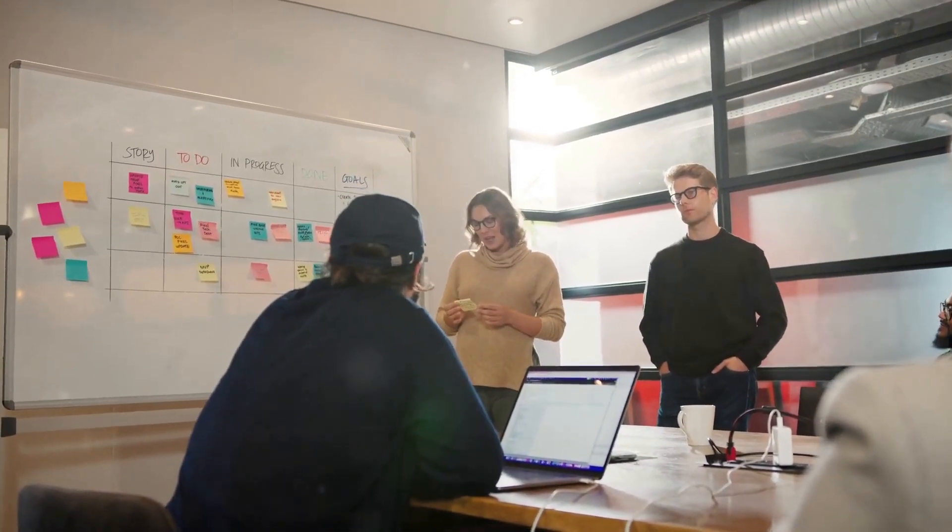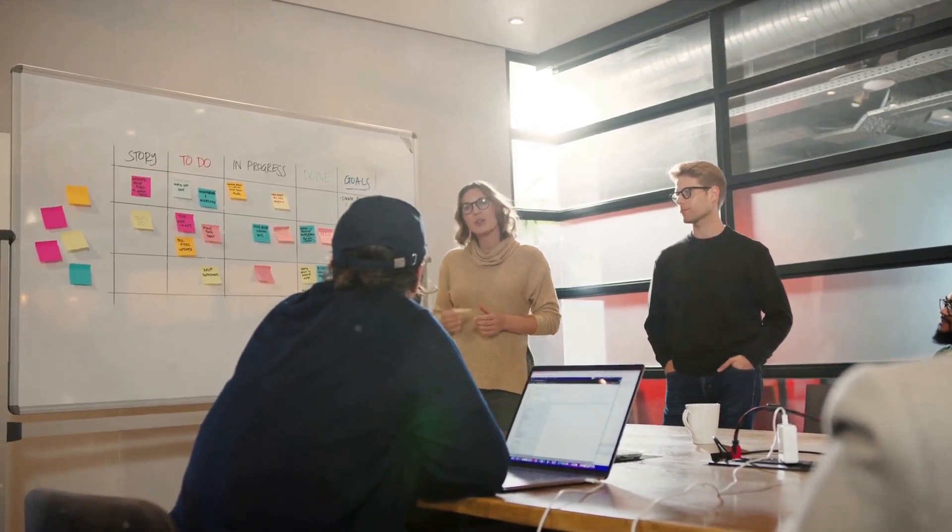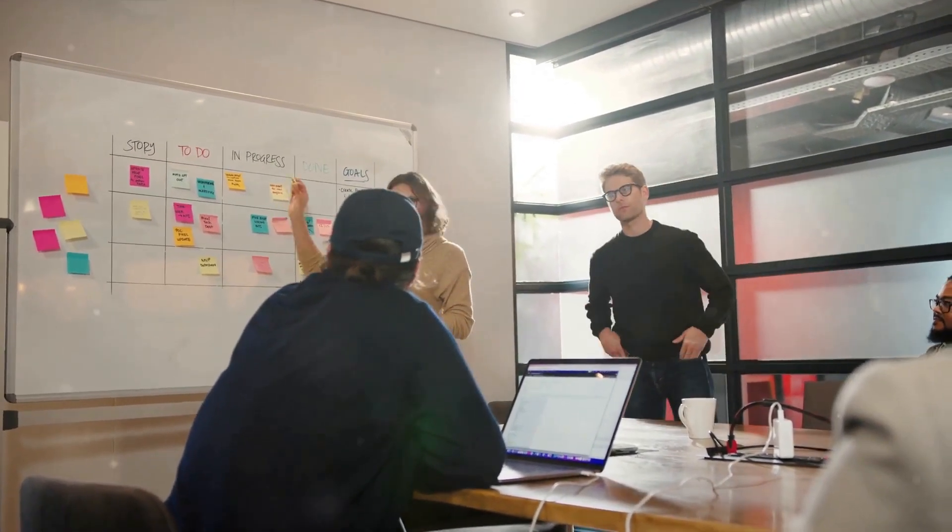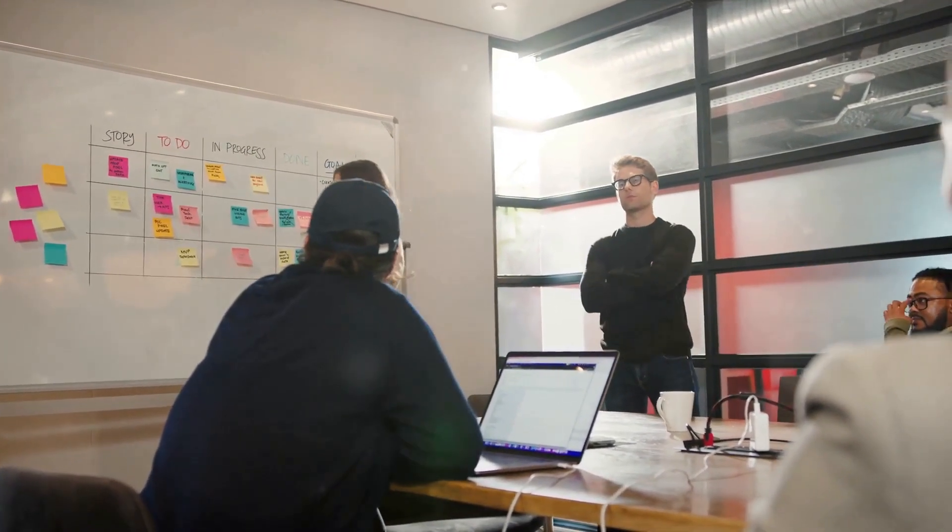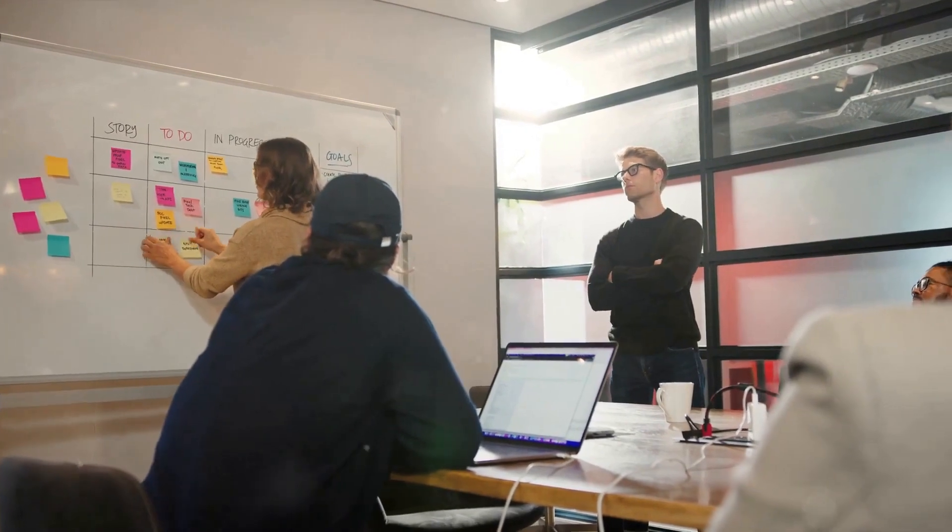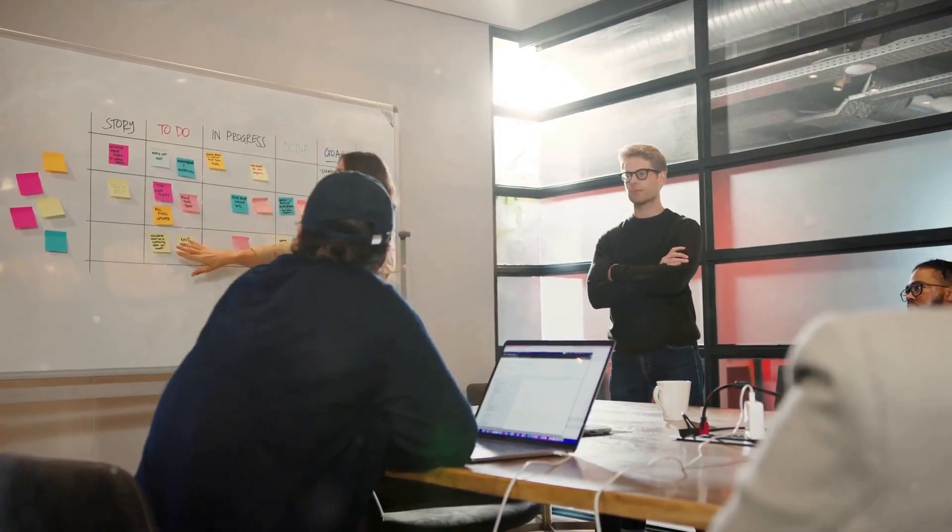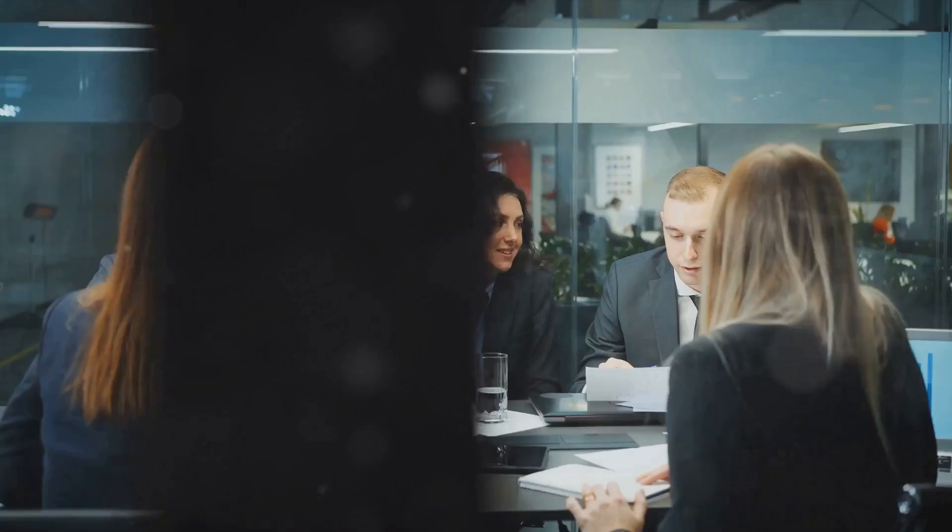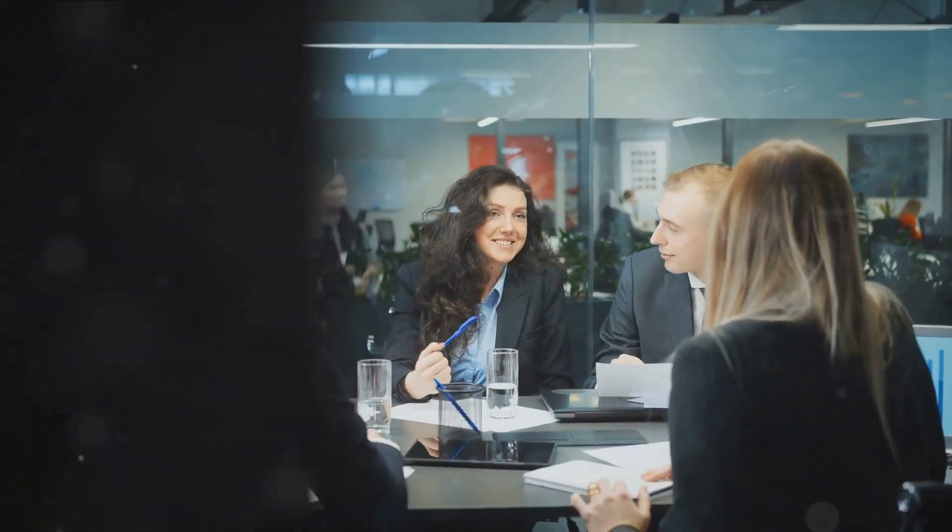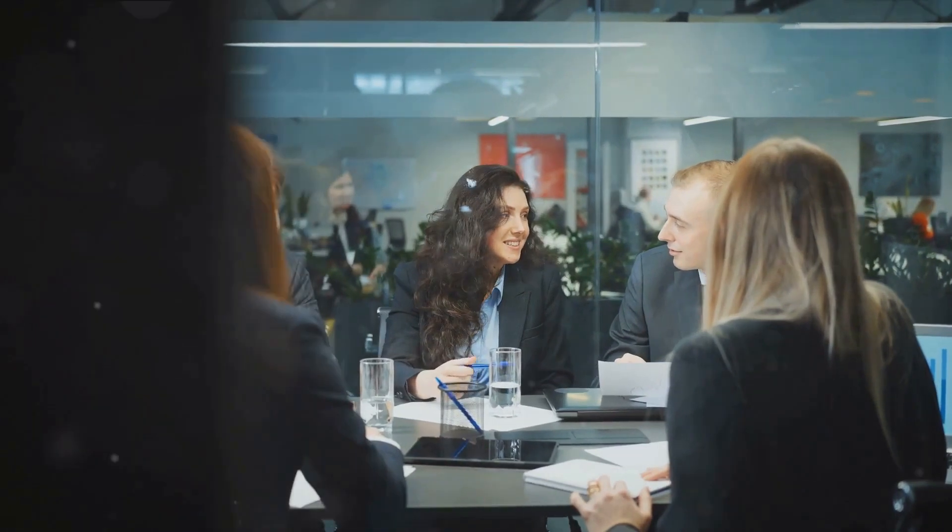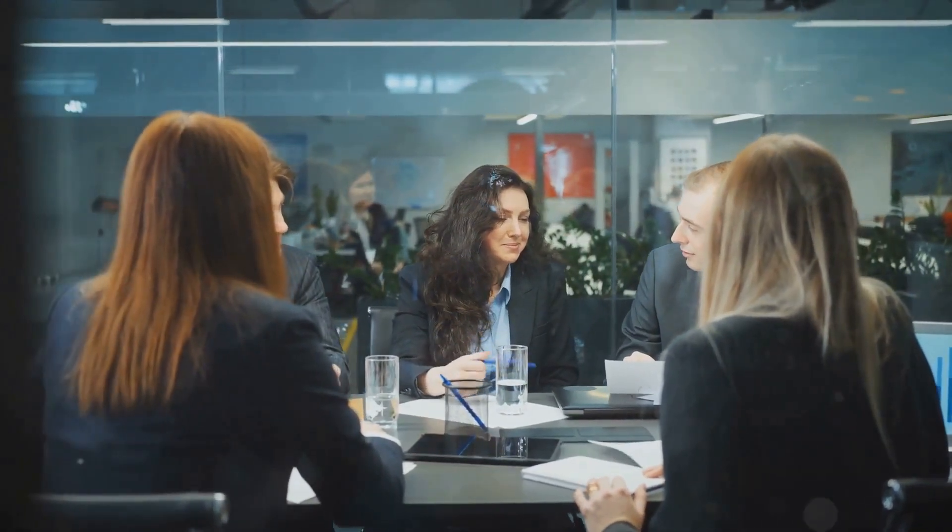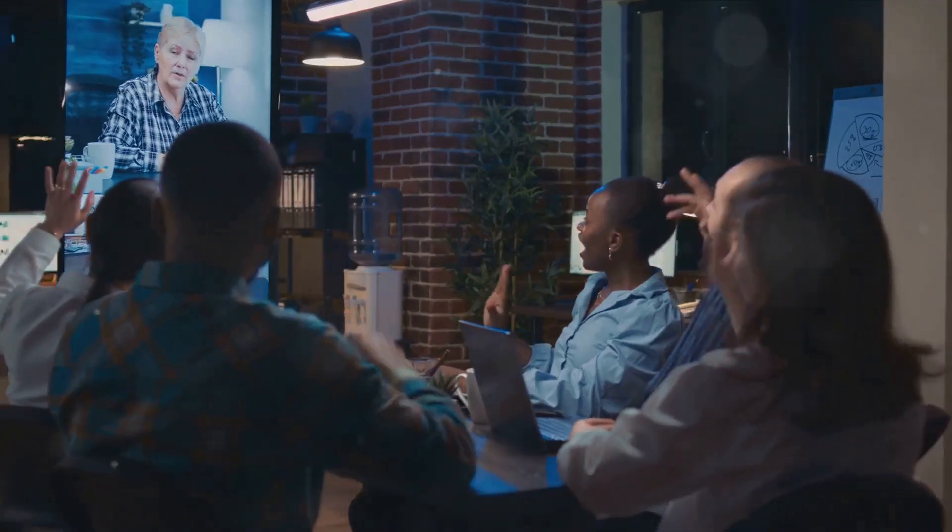In this meeting, each team member shares three key pieces of information: what they accomplished yesterday, what they aim to achieve today, and any roadblocks or challenges they might be facing. It's a brilliant communication tool that keeps everyone on the same page and promotes transparency.